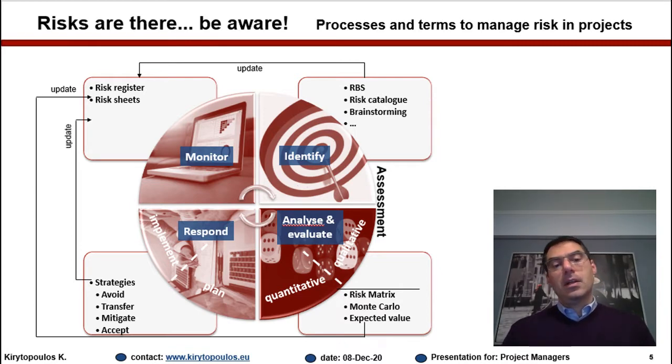And you will see that lately the Project Management Institute, when they drafted the new PMBOK, and specifically the chapter about risk, divided the response stage into two sub-processes. The first one is planning response, and the second one is implementing response. And obviously, it is not that all these years we did not implement responses. Of course, we did. But the point here is to stress that sometimes we take decisions about responses, but we do not really reach the implementation stage.